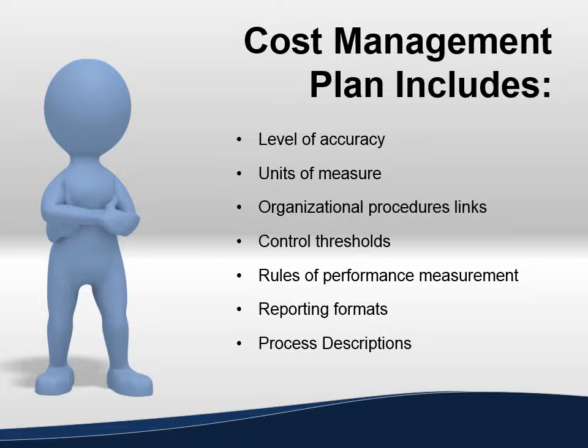control thresholds, which define thresholds for when cost variations have grown to a level where action is necessary, rules of performance measurement, reporting formats, which describe the format and frequency of cost reports required for the project, and process descriptions, which describe how to perform all of the cost management processes.